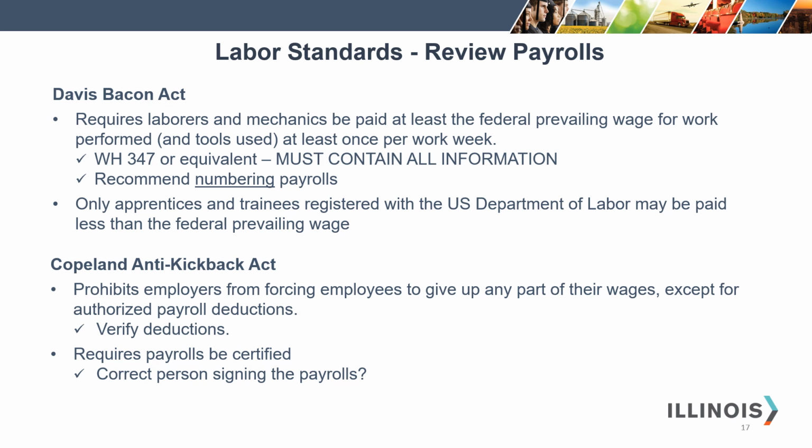The Copeland Anti-Kickback Act prohibits employers from forcing employees to give up any part of their wages except for authorized payroll deductions. When you're reviewing your payrolls, please verify the deductions. And the Copeland Anti-Kickback Act requires payrolls be certified.